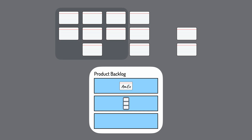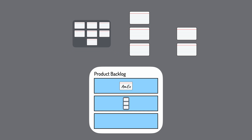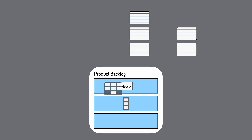Finally, a sequence of columns can become one big backlog item. On an e-commerce site, users can search, save items to a wishlist, check out, and more. Wishlists will span multiple rows and columns and could become one large product backlog item. This is a good idea if you won't develop that feature for a while.